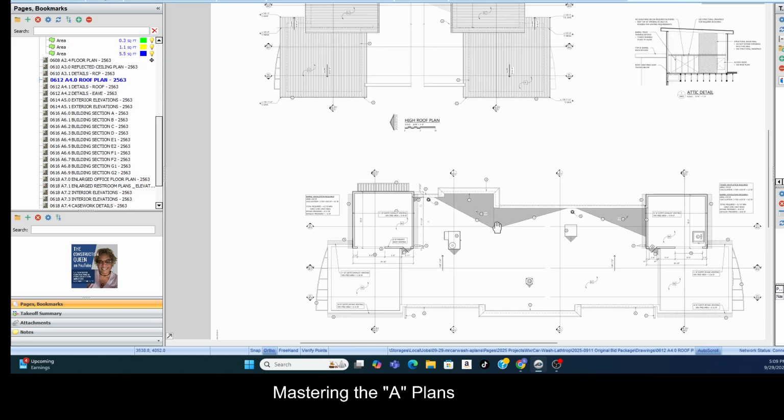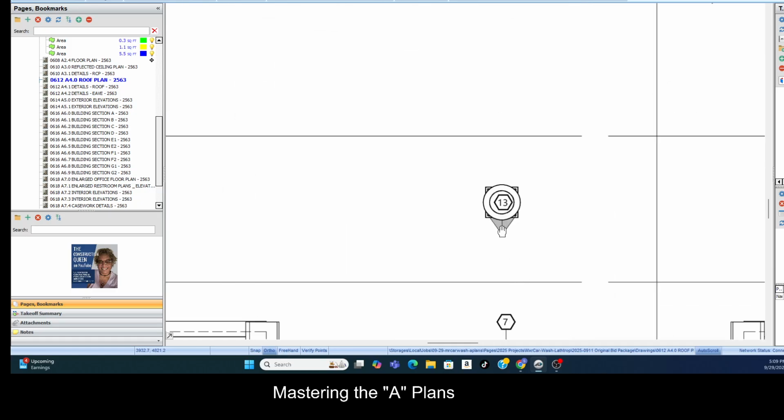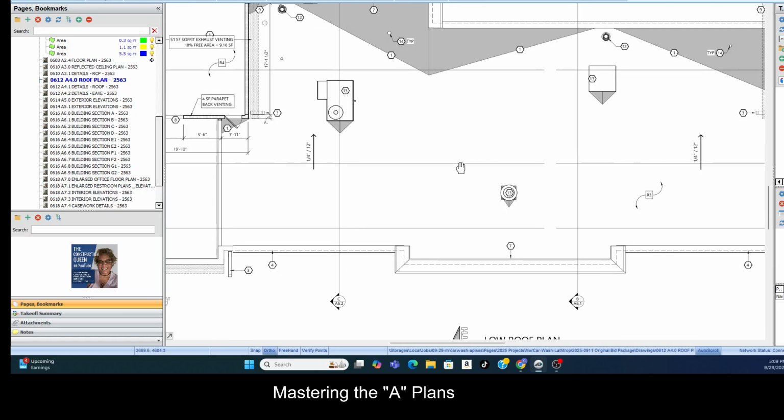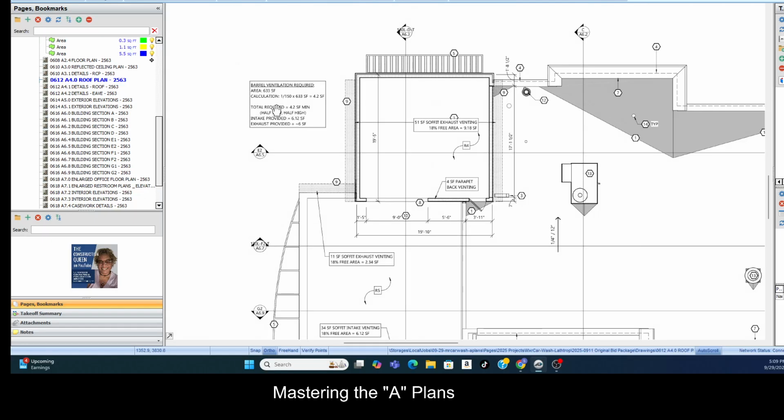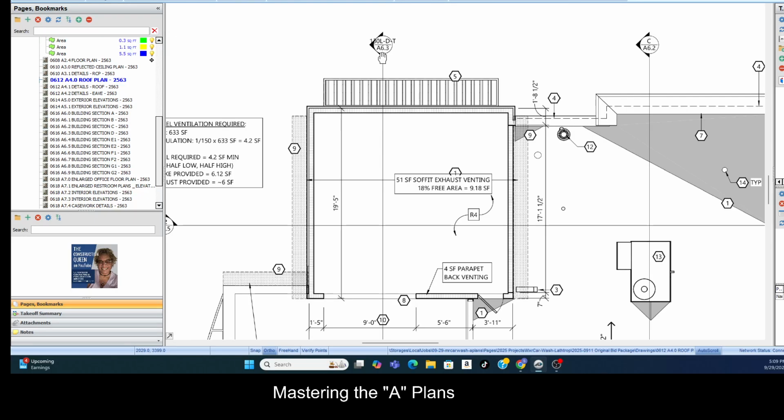We never want that. Okay, I think they might have a little one here at their exhaust fan. So for the roofer, we're just going to measure how many squares, and then we'll take into account the pitch. But the pitch in this roof isn't enough to take into account. It's not like shingles or anything. So now, section view, of course.